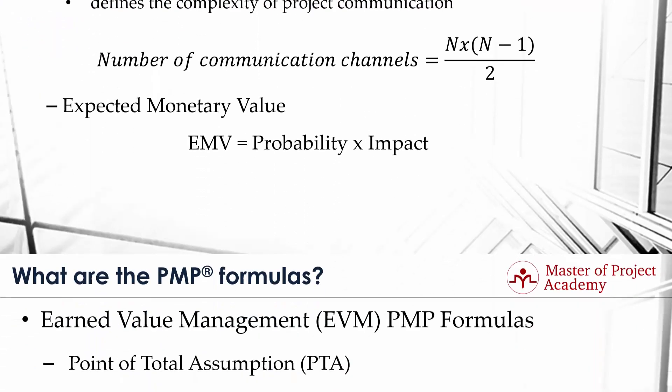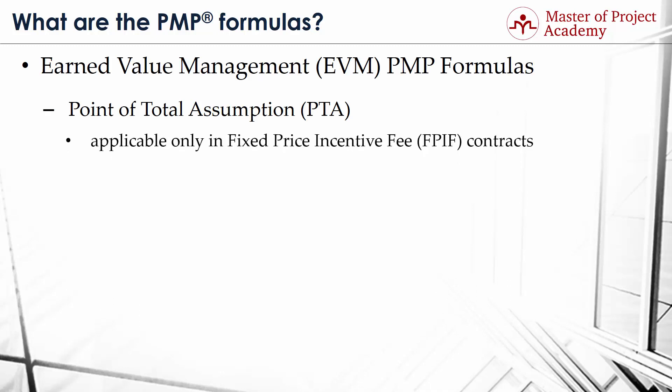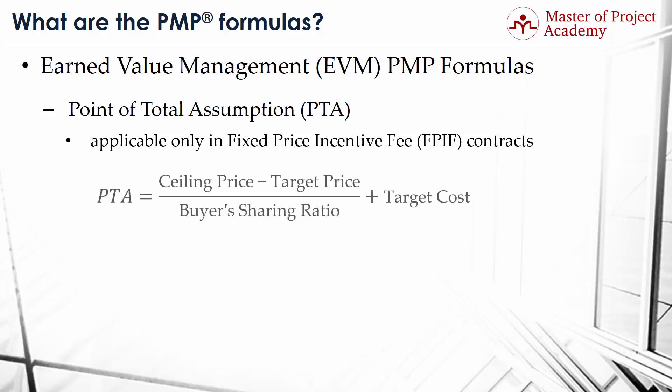PMP formula number 15: Point of Total Assumption or PTA. PTA is applicable only in Fixed Price Incentive Fee or FPIF contracts. Costs above the PTA level are considered to be due to mismanagement. PTA equals the result of ceiling price minus target price, all divided by the buyer sharing ratio, and then that result added to the target cost.